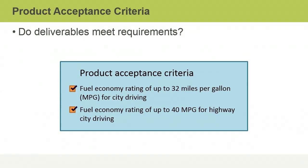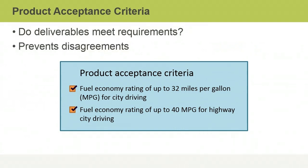A project scope statement should include product acceptance criteria. These are the standards stakeholders and the project team agree to use to judge whether the project's deliverables have met requirements. The criteria play an important role at the close of a project or any of its phases. They are used to verify scope and to confirm completion and acceptance of deliverables. It's important to detail product acceptance criteria, otherwise it's possible that not everyone will agree that a requirement has been met or even that a project is successfully completed.